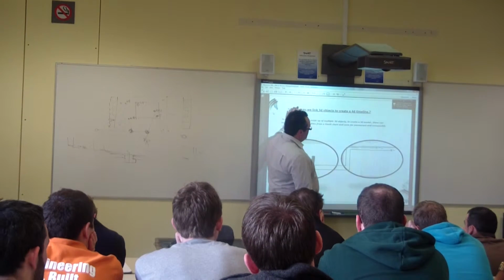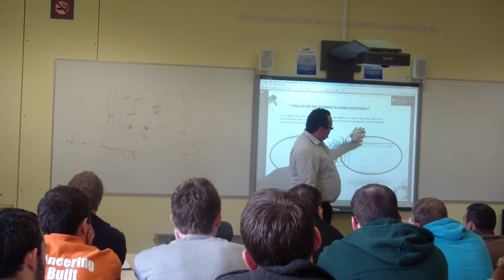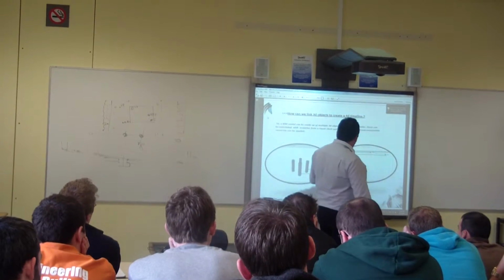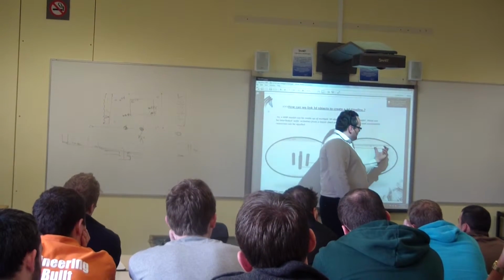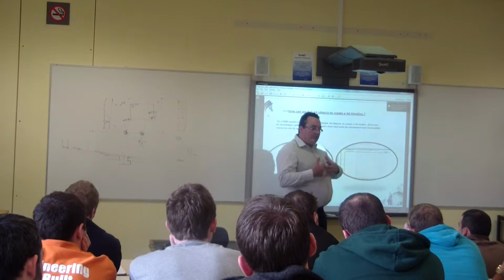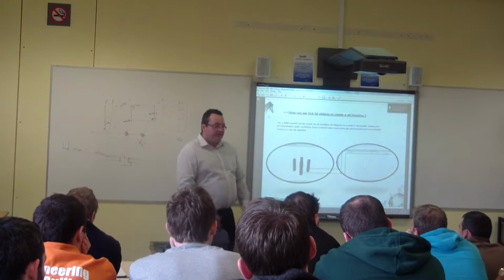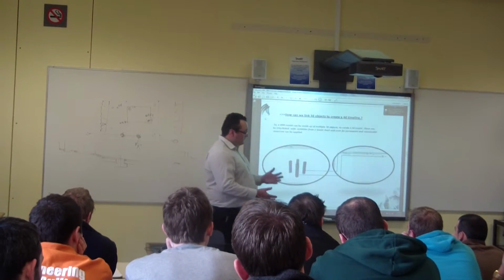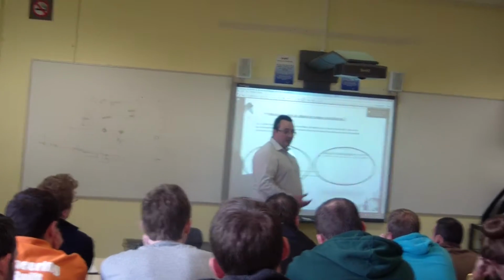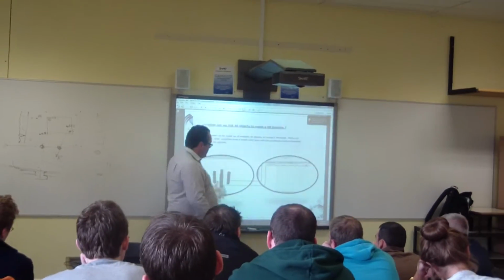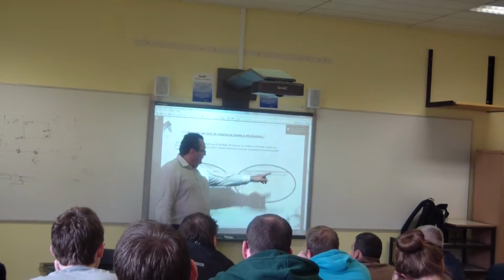Now, there was a delay in the program further up at the design stage because the architect never handed over to the engineer, so the procurement of rebar was late. It then pushed that program out. The cash flow was pushed out. Your plan 5D was pushed out. So that's forensic delay analysis in planning and scheduling terms. So, back to the 4D thing again, all it is is columns into your Gantt chart.